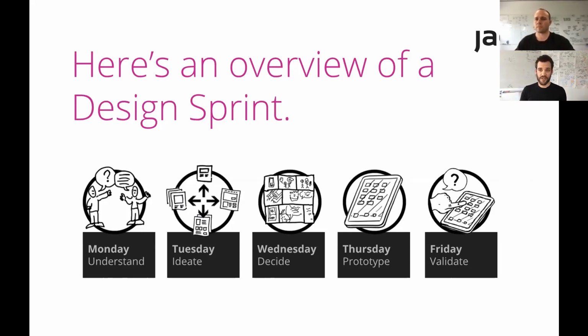Also, because no one knows everything, not even a decision maker, and knowledge is usually locked into people's heads, what we do is we assemble a team, usually between 5 and 8 people of your team for this design sprint. It's a week long, however, it's not a pressure cooker. So the Monday to Wednesday, the quite focused days, they run from 10 to 4:30. We have 1 hour lunches and breaks in between. So that gives you and your team enough time to come in the morning and get all your BAU stuff sorted so you have your head clear for the design sprint ahead.